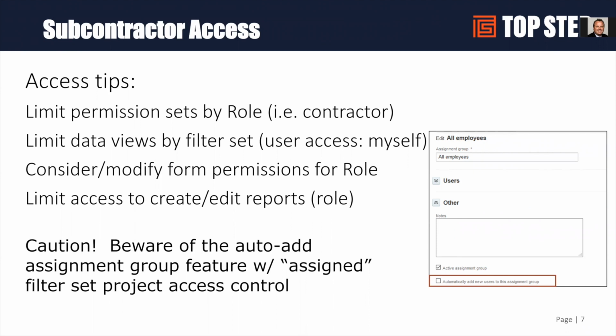One thing to be careful of is when you create a user in OpenAir, there's this ability to automatically add new users to the assignment group. If you have an all-employee assignment group, you don't want to add your contractor to that assignment group by mistake, because then they will inherit all of the internal projects and time off projects you might have, as well as some of the other projects that you don't want contractors on. So when you're creating that new contractor, if you're using that automatically add for a particular assignment group, you'll want to make sure that you remove the assignment group from that subcontractor as part of your subcontractor user setup.